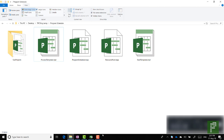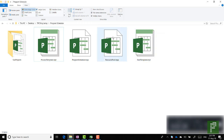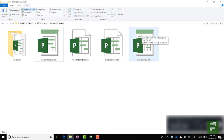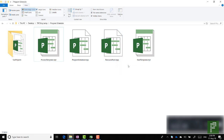The fun part about templates is that you can reuse them without tampering with the original file. It's a different kind of file icon — this is just a project and this is a template. It has a different extension: it's called an MPT instead of an MPP. MPT stands for Microsoft Project Template; MPP is the abbreviation of Microsoft Project Project.